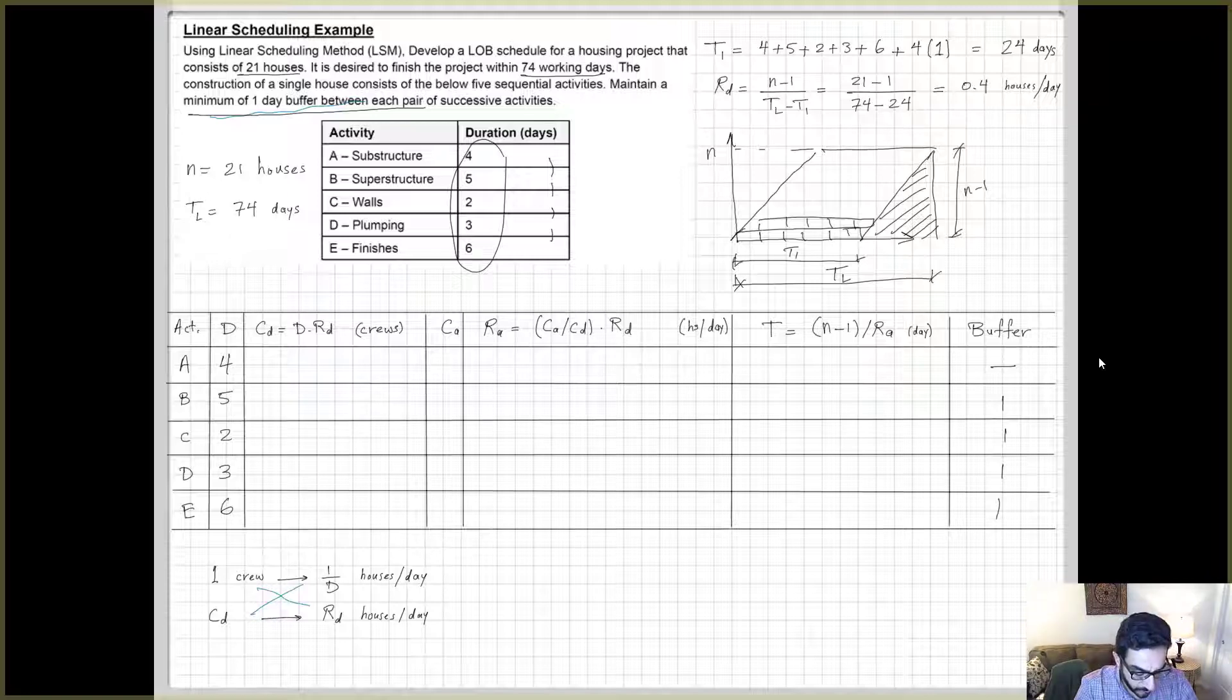So now knowing where the formula comes from, we just need to apply it. For every activity, multiply its duration if you use one crew times the required rate. For example, the first activity A, D is equal to four times RD 0.4, you end up with 1.6 crews. Doing the same formula for the rest of the activities, you end up with some values or integers, some are real numbers with digits.